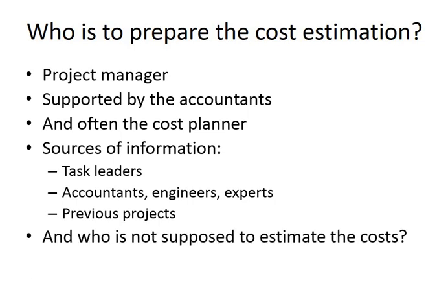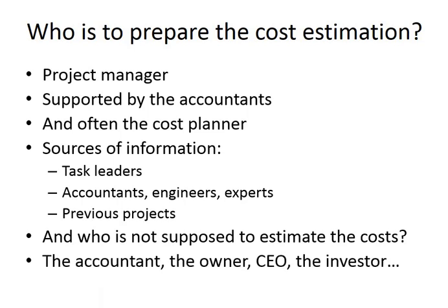There's another question: who should not prepare the cost estimation? So the accountants alone shouldn't do it, because they only rely on historical data. If they don't have this technical knowledge about the project, they cannot do it. Also, the owner himself or the CEO or the investor are not the best people to do so, as they are emotionally involved with the project. So probably they would be too optimistic.